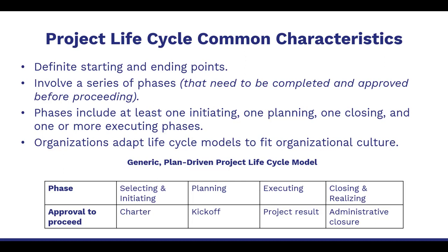The project lifecycle's common characteristics are definite starting and ending points. It involves a series of phases. The phases include at least one initiation, one planning, one closing, and one or more executing phases. Then finally, organizations adapt lifecycle models to fit organizational culture.